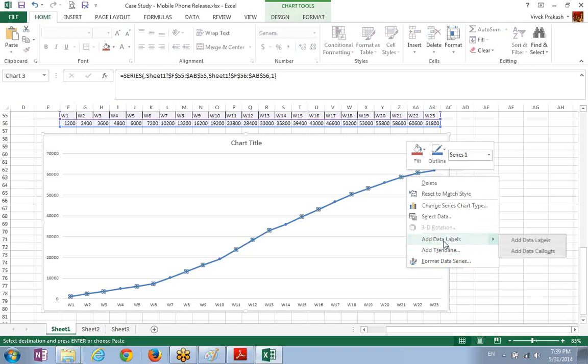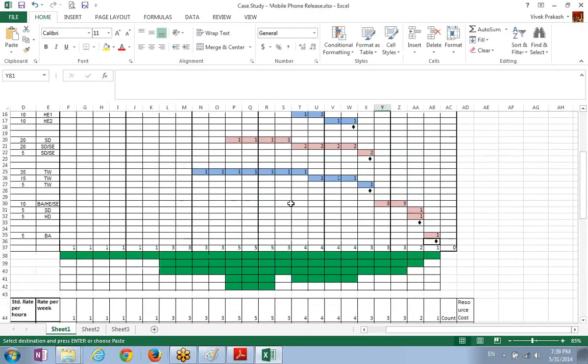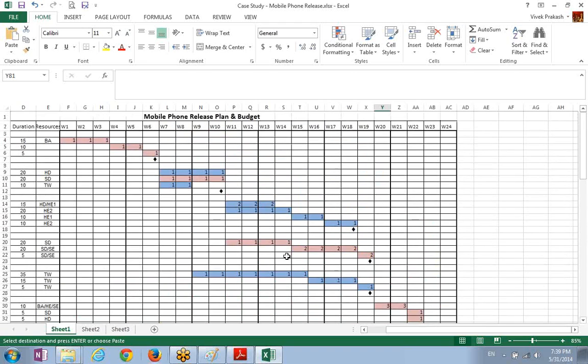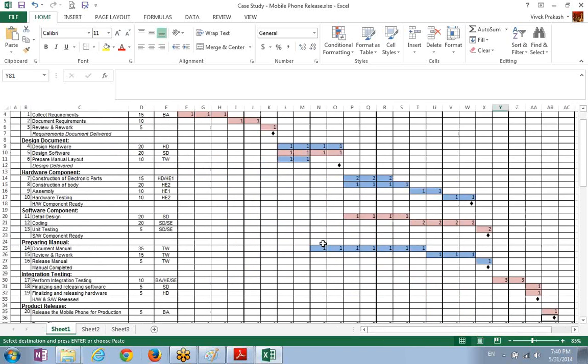Will you please explain how to identify the critical path on the chart? For critical path, I think I explained how we normally calculate it. Here I know the longest path is the critical path actually. Yeah, see, if you are using some tool like MS Project or something like that, then it will calculate it automatically. Otherwise, you have to create a network diagram of the various nodes and then calculate all the paths, like doing a forward pass and a backward pass, and then connecting all the activities with zero float. Then you get the network path.